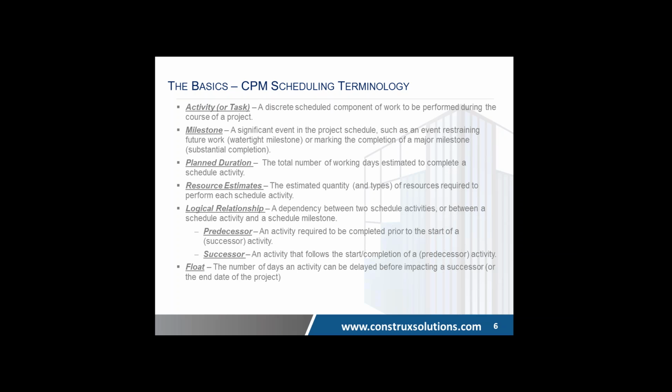A milestone is a significant point in time that a schedule has. It's not an activity, it's just a milestone. It's just a point that the activities all lead up to or begin with. So like notice to proceed is a milestone. Watertight is a milestone. Completion is a milestone. Substantial completion. These are all points which you want to measure against.